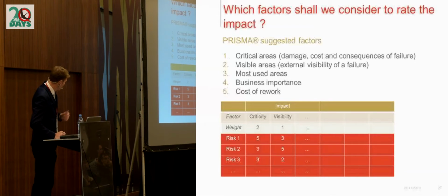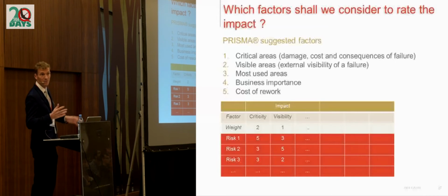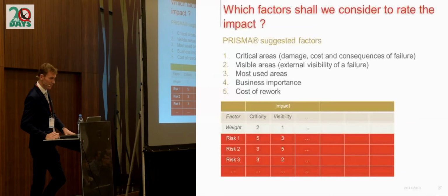And we have these 5 factors. Each factor should be rated, assessed for each risk. And it may be useful to weight the factors. You can consider that in your project, one of them is more important than the others. It's also possible to ask several people to rate the same risk. There are many ways of using that.